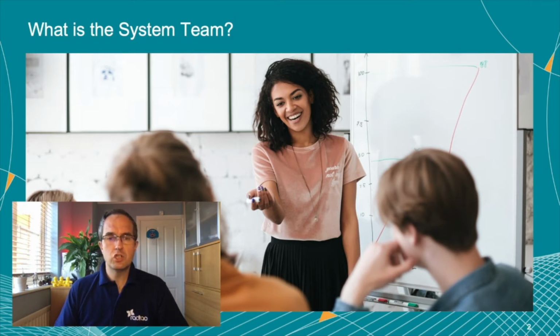Now, while some will assume the system team works only at the essential level, the system team can and does work at any level in SAFe. Hence this addition to the spanning palette on the side of the big picture. The system team may also serve multiple ARTs, solutions, or the portfolio. Having a system team is actually optional, but having the capability isn't. If an ART has the capability to undertake the work the system team normally handles within the train, then having a dedicated team isn't needed.